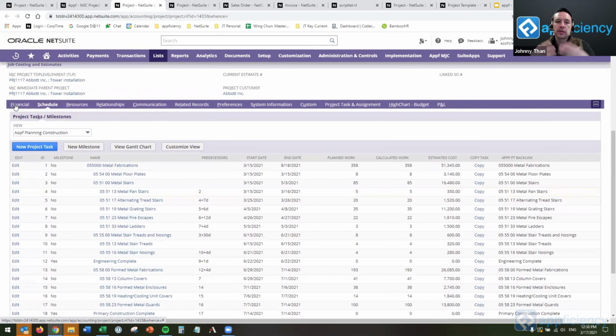The cumulative budget cost, which I smooth peanut butter spread at 8,000 per period, is this steady slope. And so you get to see that I'm actually going to breach my line. I'm going to be under my line thinking I'm doing great up until June. Then all of a sudden, July, I'm going to go way over. So this is a very good, simple way to find out where I'm going to see a change in behavior in the project. Not only can I use this from a visualization perspective, I can act on it.